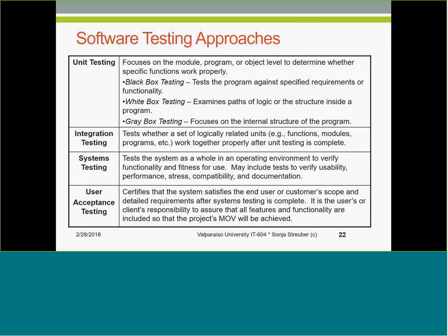Having said that, we want to make sure that we understand that in our user acceptance testing, our user performs this alpha code review, right? User acceptance testing is alpha testing still. And once our user acceptance testing has completed and our user has signed off the product, saying yes, it is good enough to go to market, then our product gets deployed, right?